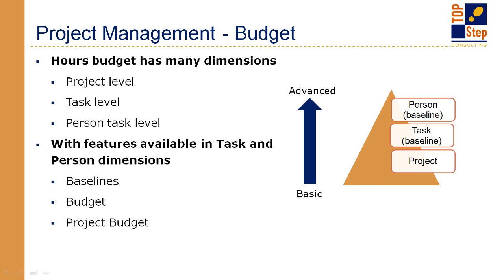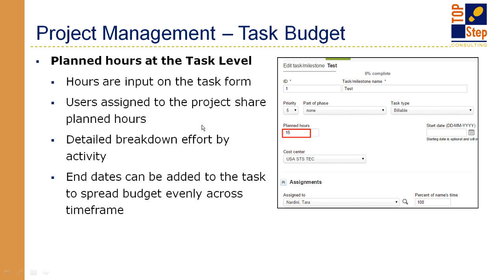Okay. So planned hours at the task level. I often run into clients where there's a switch in the system, and they may be assigning resource hours because they weren't aware that they could just plan at this task level. They don't need that extra level, and it's quicker and easier for them to just plan, here's the total hours I need for this task. Now, you lose visibility to how many hours each person has, because when you plan at the task level, you're basically spreading those hours evenly across anyone who's assigned there, because you're not allocating them out specifically.